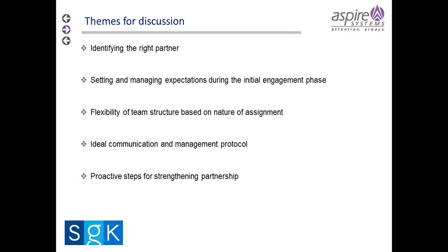And then for each project, I think we have been very strict about building a statement of work around that engagement and saying what's included, and often the most important thing is what's not included, right? It is this and this and this, but it's not this other thing. And that type of communication up front keeps you from falling off track when you get into project execution, because everybody knows here's what the responsibilities are. So I'd say that's part of the initial development: building a document framework around the relationship and setting expectations.